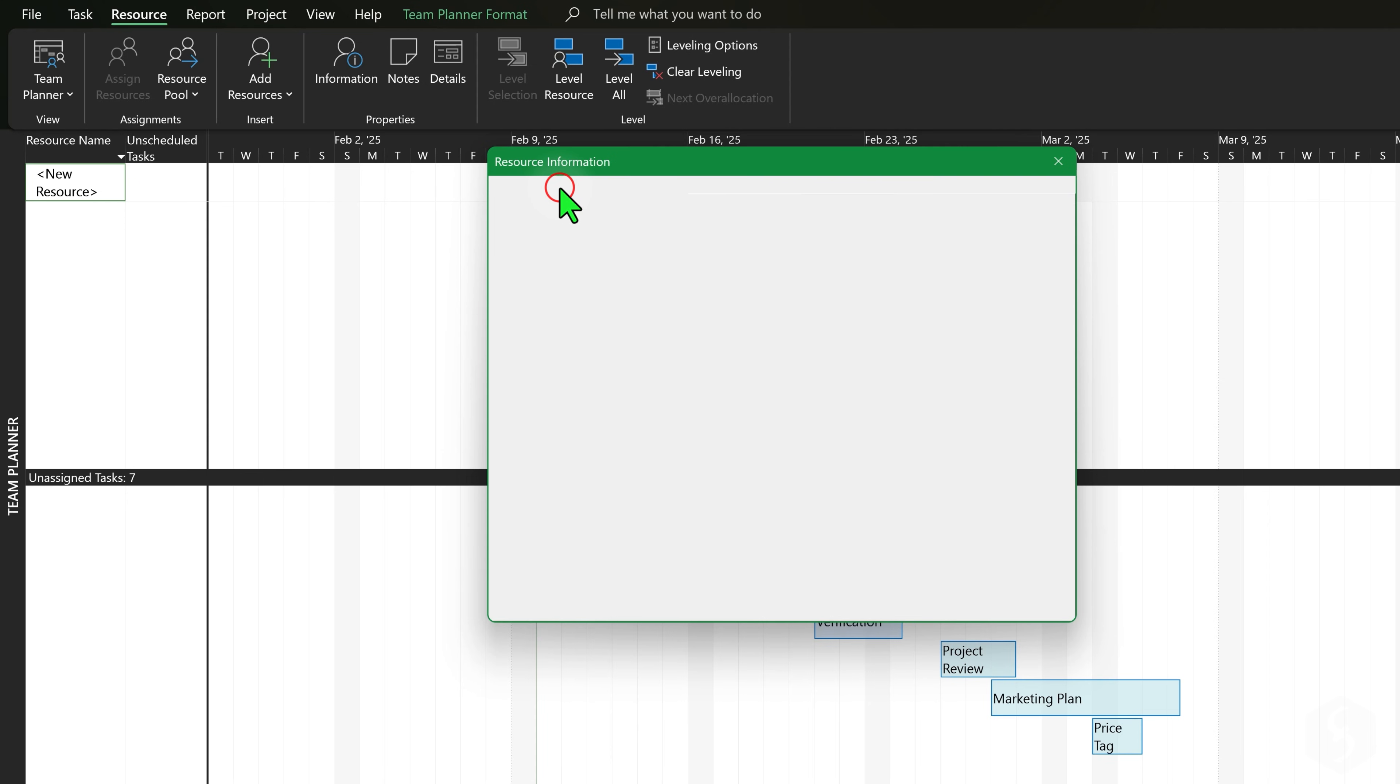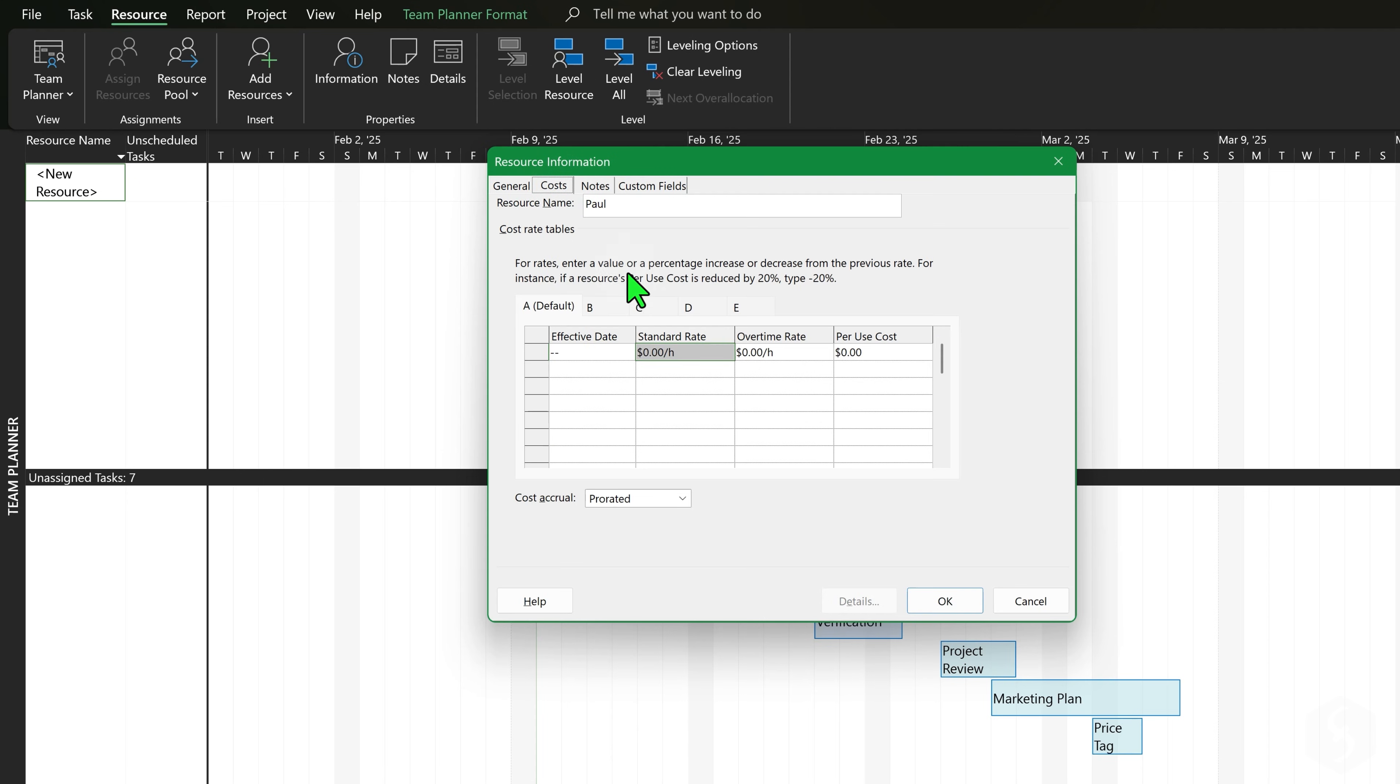Under Costs enter any wage and overtime rate expressed in hours, weeks or months.